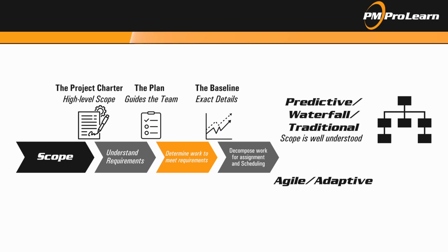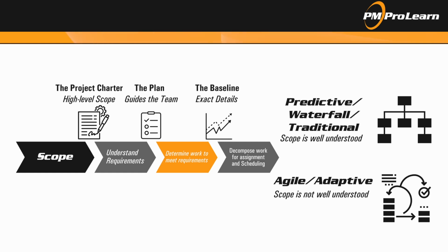However, you may choose to use an agile development approach. This is a preferred way when requirements are uncertain or evolving. It may use a product backlog or Kanban board for flexible scope management and utilizes sprints or iterations for short, time-boxed work cycles. In all, our scope management best practice is to understand which step you are in.